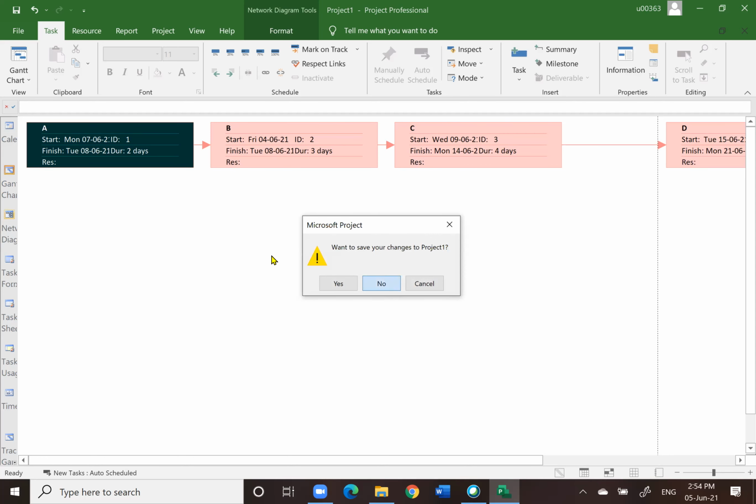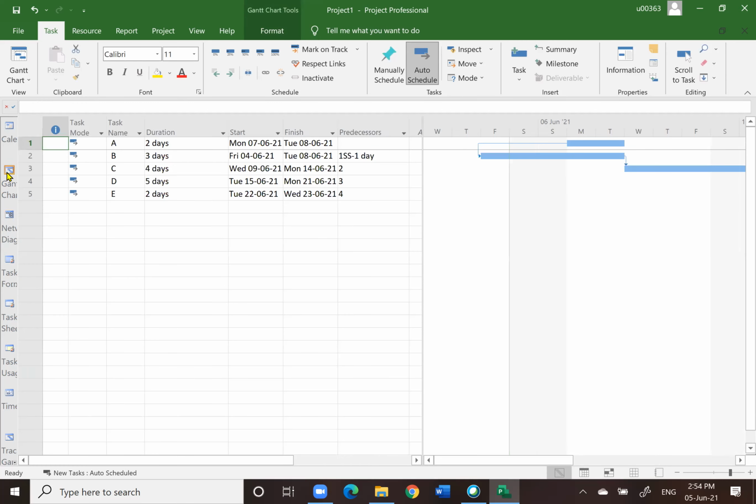Now, okay, let's go back to the Gantt chart. Now you see the Gantt chart here now shows the right things. Because for A and B, I put negative. Negative means I advance the starting of the following activity B by 1 day. And since it is a holiday, it looks longer, because Saturday and Sunday are not working days. So Friday is the working day. It's still 1 day. So I put ahead for the starting of B.